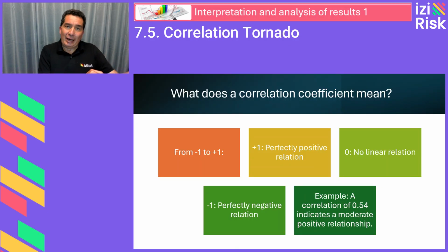Correlation is a number between -1 and +1. When it's positive and close to 1, it means that when the task becomes more expensive, or the risk, the overall project also tends to become more expensive. When it's close to 0, the task has little to no relationship with the total cost. If it were negative, which is not the case here, it would imply that when the task becomes more expensive or the risk, the project cost tends to decrease. Rare but possible under certain conditions.